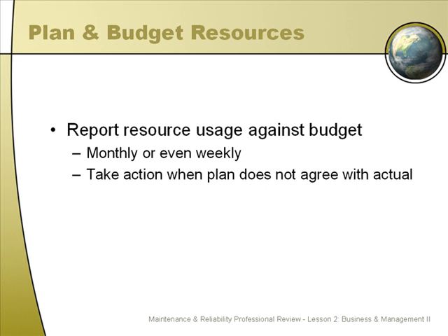Report resource usage against the budget. Well, here we go again. You built a plan, you built a strategy, and you told people what the action items would be in your business case. If everyone agreed to that, then you should be reporting what you're doing and make sure that you're following along with your spending guidelines. This should be done at least monthly, or even weekly in some cases. It just depends on how your operation works and how much information you need to keep things running smoothly.